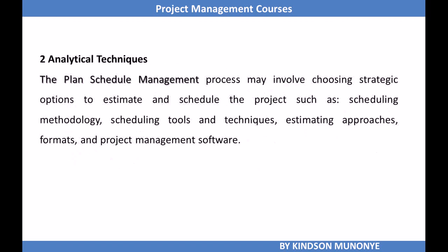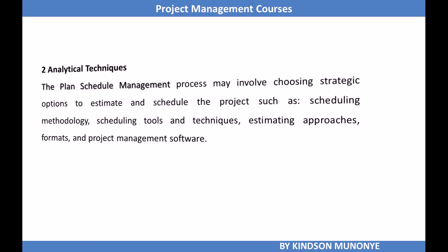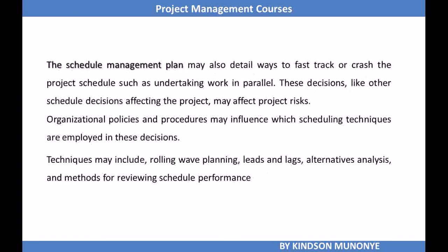The plan schedule management process may involve choosing a strategic option to estimate the schedule and schedule the project, such as scheduling methodology, scheduling tools and techniques, estimating approaches, formats, and project management software. The schedule management plan may also detail ways to fast track or crash the project schedule, such as undertaking work in parallel.